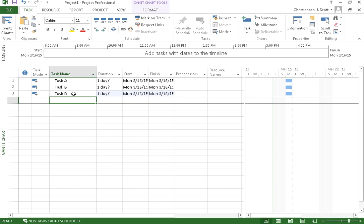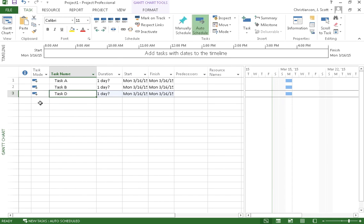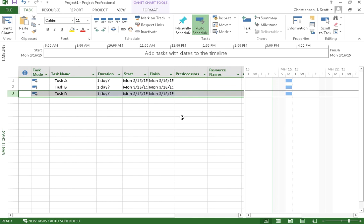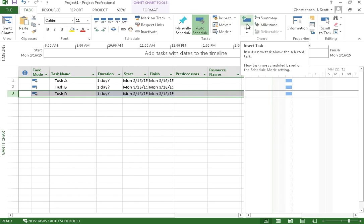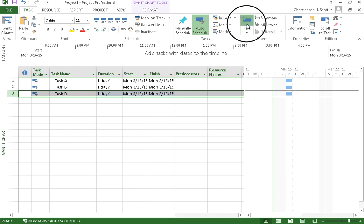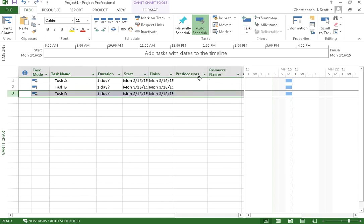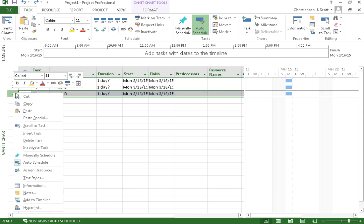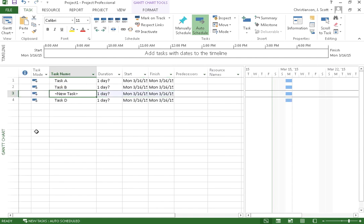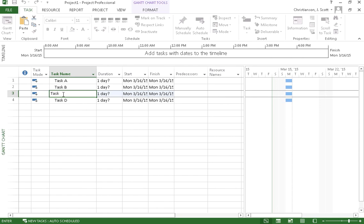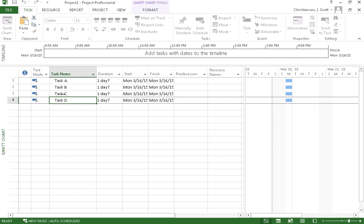We can also insert a task. For example, let's say I forgot task C here. I would select task D either by selecting the row or just clicking on that particular task name. And then I can come up here to, if I'm in the task ribbon, I can come up here and select insert task. That's one way to do it. I can also just right click on that row and select insert task and it will let me insert that task. And then I can actually name that task just as before.